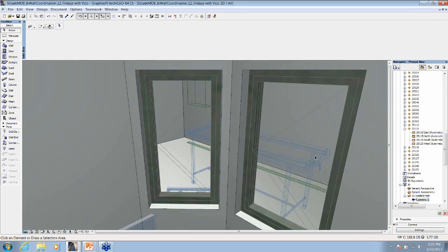Obviously, if it was only recognized after the opening of the hospital or the medical plaza, it would have been way too late, and changing these windows would have cost much more, because these windows would have been already ordered and placed, and most likely for a few days by changing these windows in these not too simple partition walls, even the X-ray rooms would have been closed.